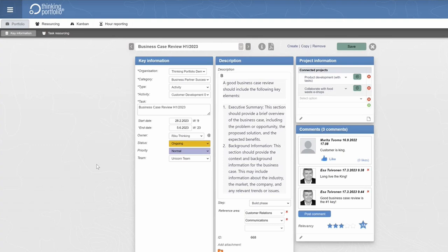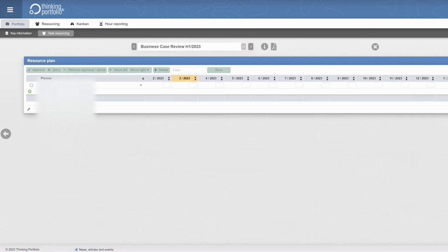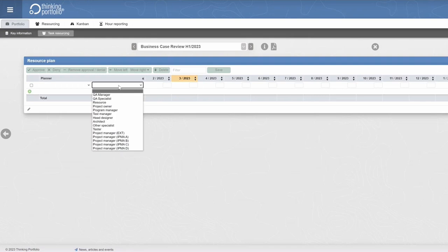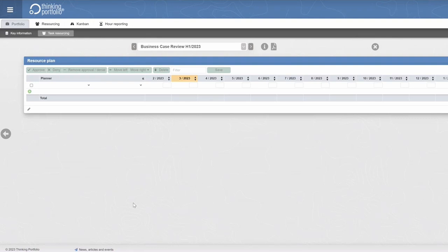Also, skill tracking is an opportunity, and that's part of the task sourcing. Once you tell that you have a certain person or role or task that needs to be done, we can tell what kind of skills, knowledge, and experience a certain task or certain roles in a task need. Behind skill tracking, you then know who the available people are to do the task with that special knowledge or maybe a certificate needed.